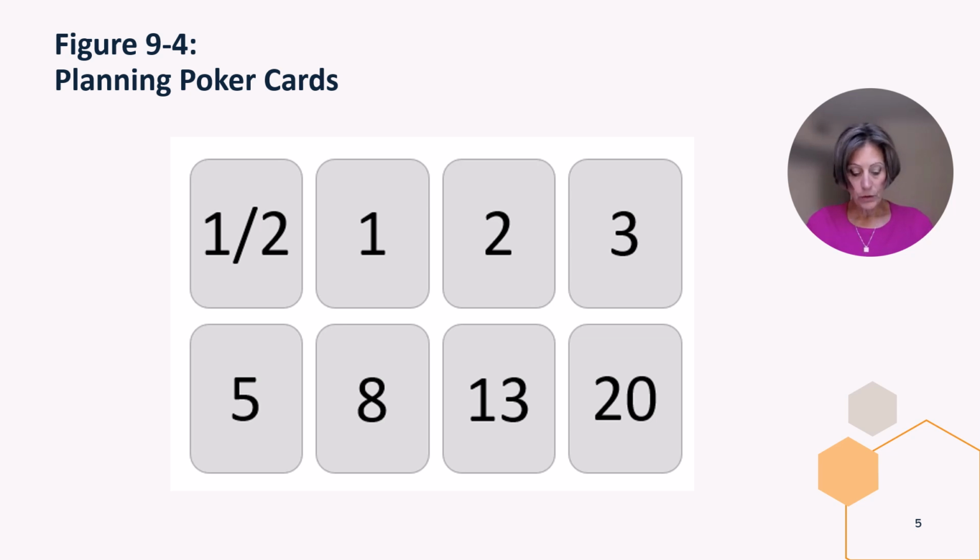It is the joint responsibility of the product owner and Scrum team to agree upon a reasonable release schedule that is implemented during sprint planning sessions. The product owner will review each incremental release during a review and demonstration at the conclusion of the appropriate sprint. During the sprint planning meeting, the product owner will define acceptance criteria that correspond to the user stories. During the sprint review meeting, the development team will demonstrate the functionality that they have created and that meets the acceptance criteria for the user stories worked during that sprint.